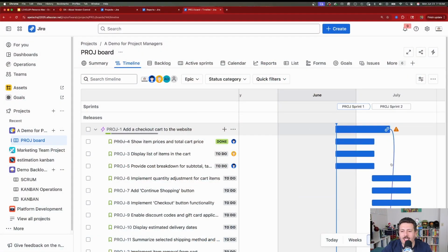And so you either push the date on your epic, right? You add more date to your epic, or you cut some scope, right? You say, okay, well, since we have to finish by this date, what can we actually deliver? What should we reprioritize? And that's going to let you visually see this information so you can make those determinations.